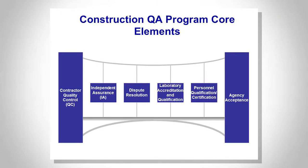This is an expansion of 23 CFR 637 related to construction. On the far left is the quality control stem — remember the three-legged stool. On the far right is acceptance. In the middle are other attributes related to the material sampling and testing program required as part of the Federal Highways program: independent assurance, dispute resolution, laboratory accreditation and qualification, and personnel qualification and certification.